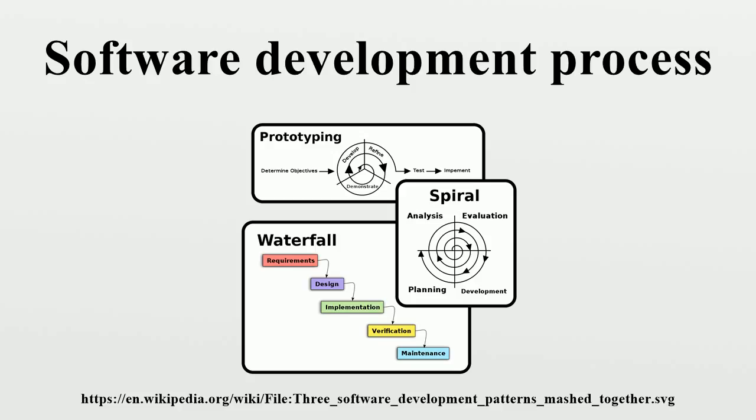Unified process is an iterative software development methodology framework, based on unified modeling language. UP organizes the development of software into 4 phases, each consisting of one or more executable iterations of the software at that stage of development: inception, elaboration, construction, and transition. Many tools and products exist to facilitate UP implementation. One of the more popular versions of UP is the Rational Unified Process.